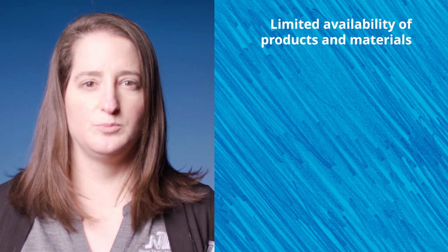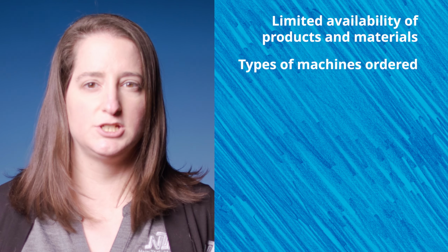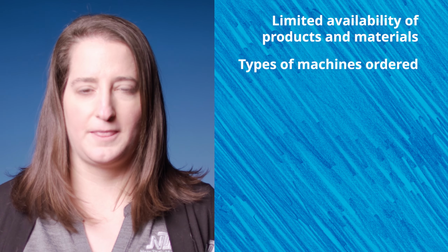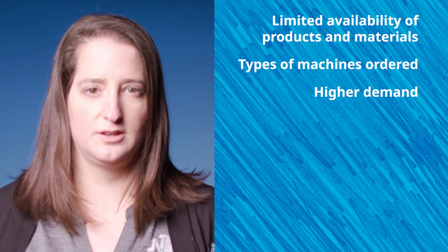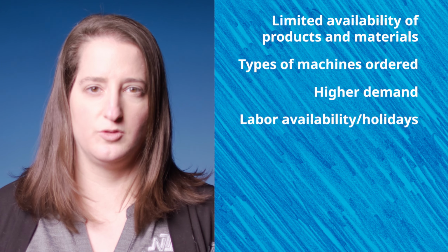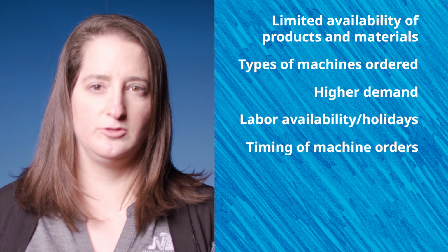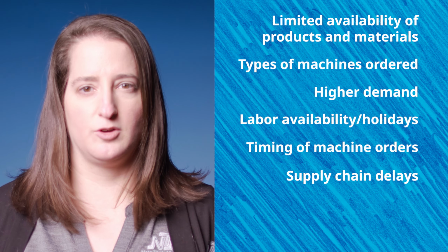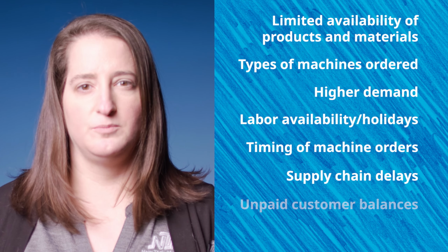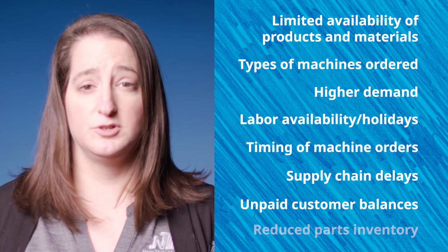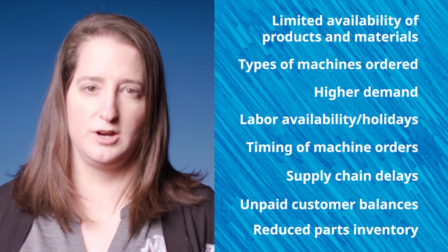Here are some of the factors that can increase lead times. Increase in pricing or limited availability of specific products and materials, types of machines ordered or machine configuration, higher demand for machines or machine parts, availability of labor or workforce shortages, timing of machine orders, delays in shipping roll forming equipment orders and materials, unpaid balances on sales orders, and reduced parts inventory or not having the right parts in stock.